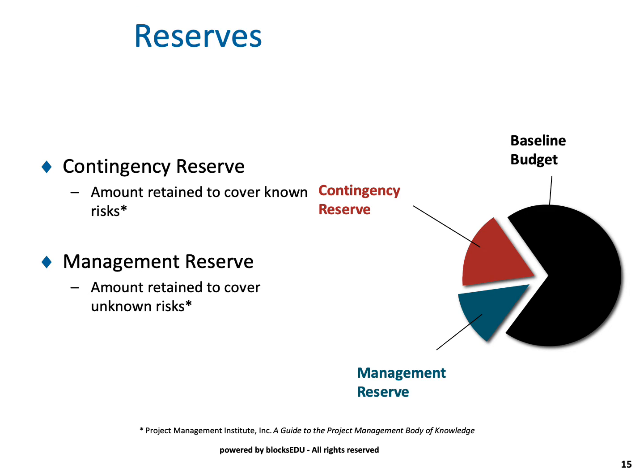Now we have our known risk, which we have our contingency reserve for. If it's not part of that, then that's where we draw this other management reserve from for the unknown risk, and only then. So what we basically have is we have our budget of, say, $1 million, as I alluded to earlier, but we don't add any extra money on that. We just reserve that money, and we only draw on it when these things occur, either a known risk or unknown risk.